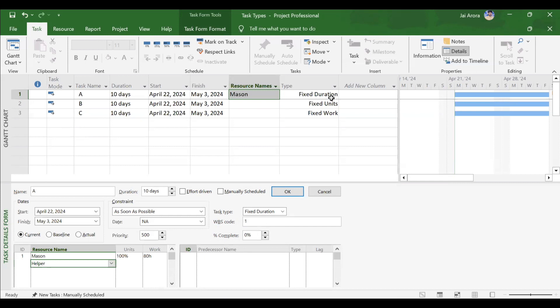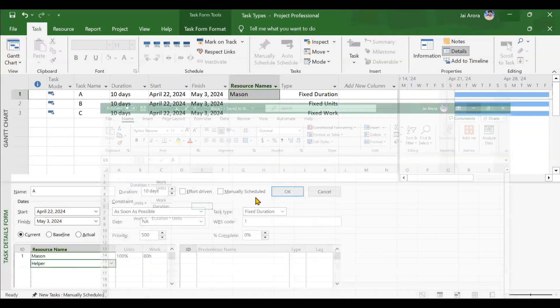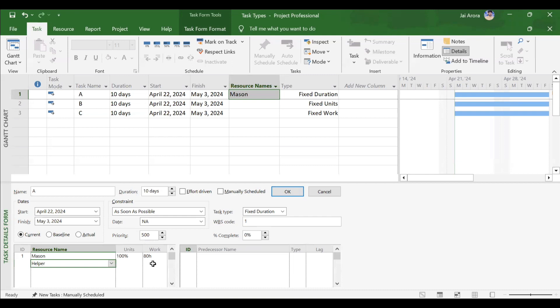With two resources, productivity gets reduced — Mason and helper both work less productively but finish in 10 days. When helper is added, units become 200% (two resources). Duration stays 80 hours. Using the formula: 80 × 2 = 160 work hours. After clicking OK, helper also shows 80 hours of work, giving a total of 160 hours — matching the formula.